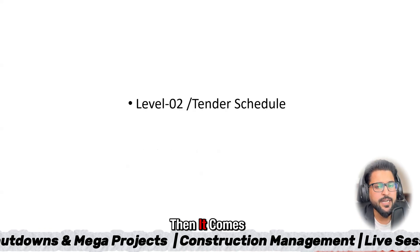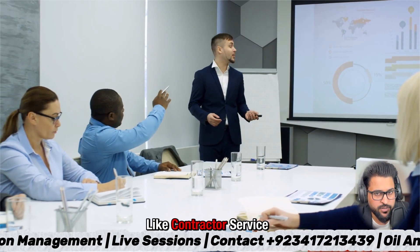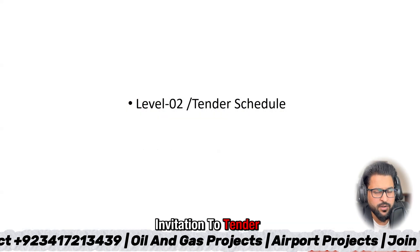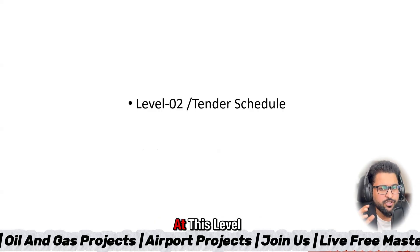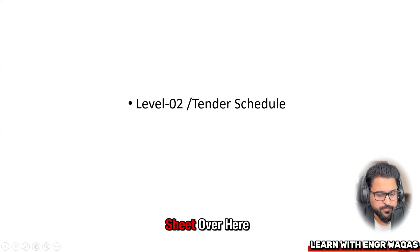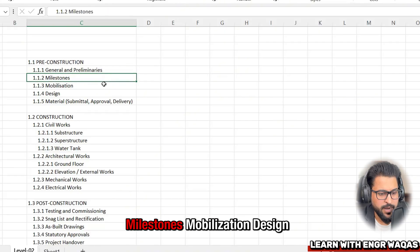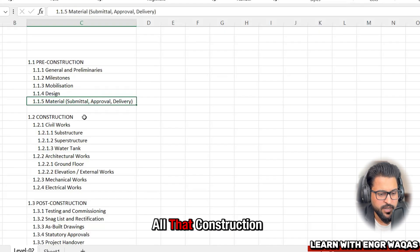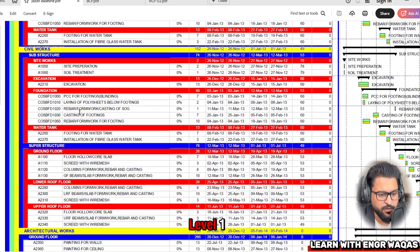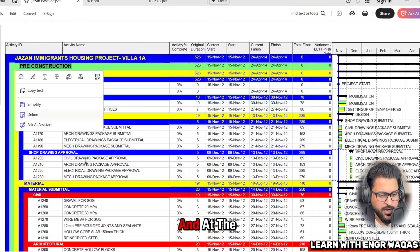When feasibility is approved and you proceed into details, it moves to Level 2 schedule. The project is awarded to a contractor, service company, EPC developer, or third party through an ITT — Invitation to Tender or Invitation to Bid process. This is called the tender schedule. In the baseline, you can see Level 1 items shown in green color: pre-construction, construction, and post-construction.